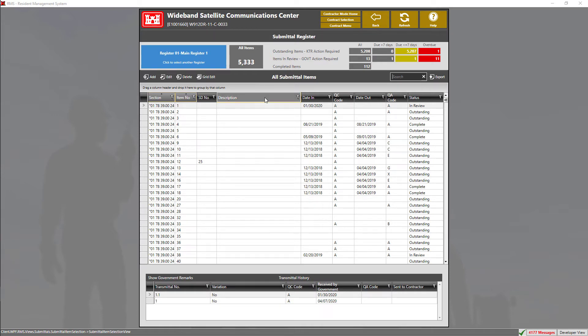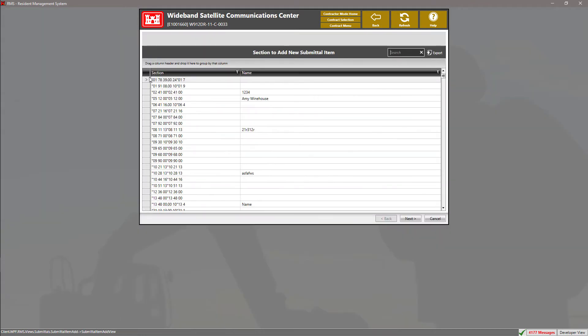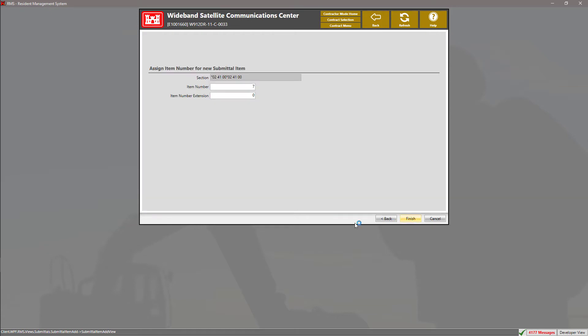To add a submittal item, click the Add button. Now, select the Specifications section for your submittal item, then click Next.